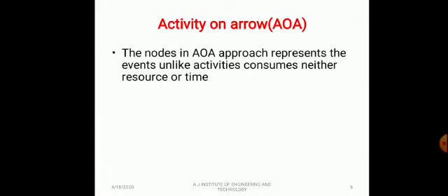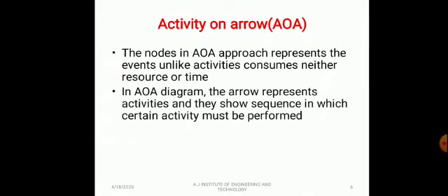Activity on arrow. The nodes in the activity on arrow approach represent the events, which, unlike activities, consume neither resource nor time.